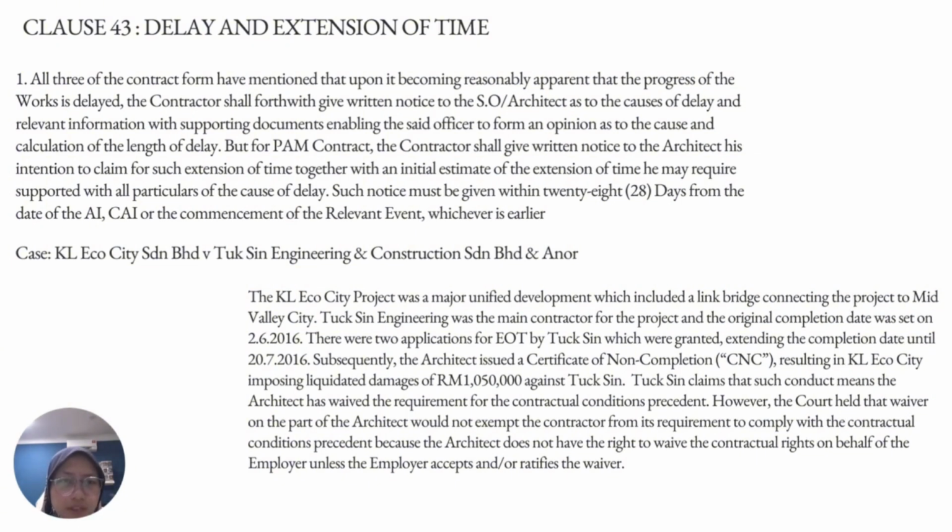But for the PAM contract, the contractor shall give written notice of his intention to claim for such extension of time together with an initial estimate of the extension of time he may require, supported with all particulars of the cause of delay. Such notice must be given within 28 days from the date of the cause or the commencement of the relevant event, whichever is earlier.